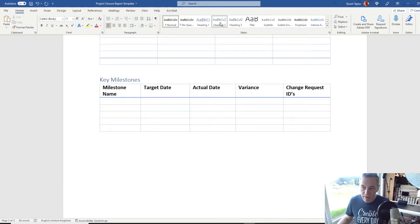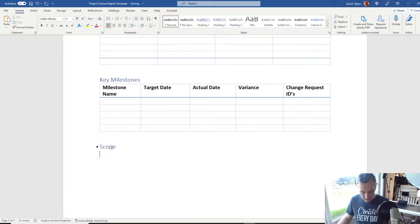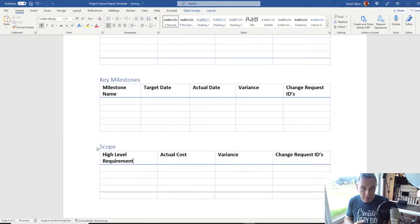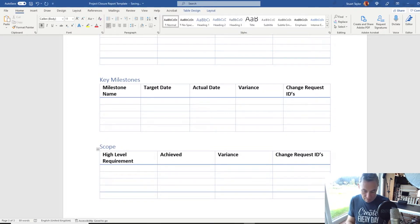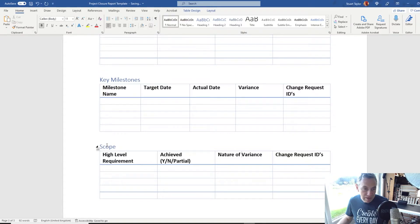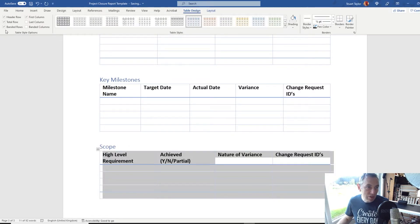Let's put another subheading in — select Heading 2 and call this one 'Scope'. We can paste that table in again. For this one, put 'High Level Requirement'. You can go into a lot more detail, but you should have a requirements document that will have kept track of all of this. Put a simple statement of whether each requirement has been achieved or not. Leave 'Variance' on here so you can explain the nature of any variance that has occurred, and again leave a section for the change requests. Then highlight the table, go to Table Design, and get rid of the total row.